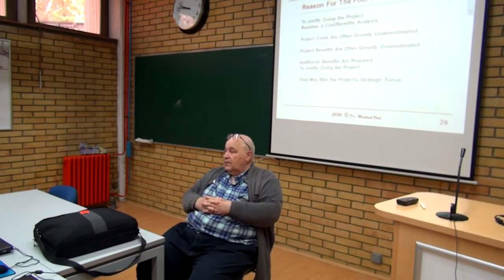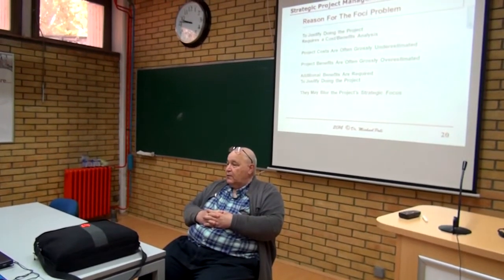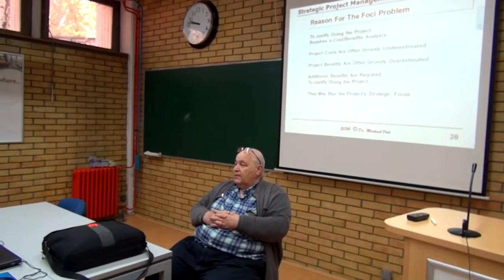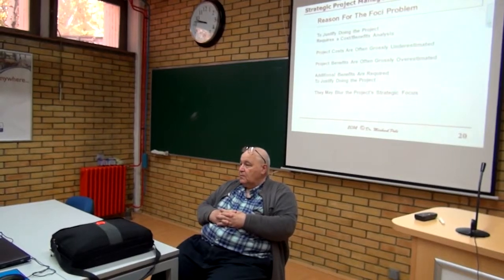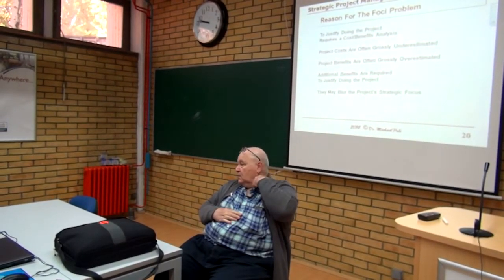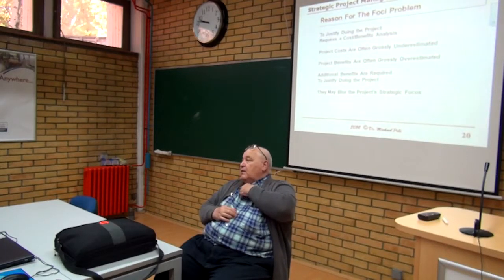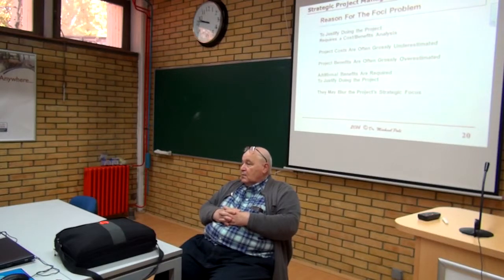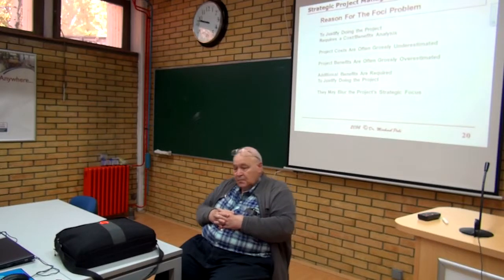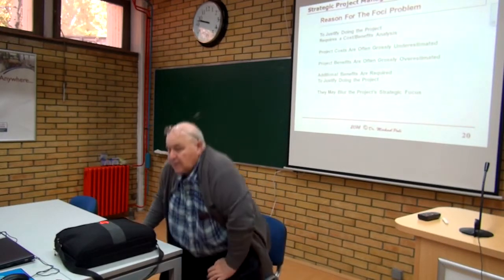What you find is that cost advantage is best for internal projects. Probably customer focus is best for external projects. And product focus is the second best for external projects. Okay. And typically, again, time is not one of the major targets for most projects. Usually it's something that's caused by the government or some kind of external force that's saying they have to meet a deadline. Not many projects occur like that.